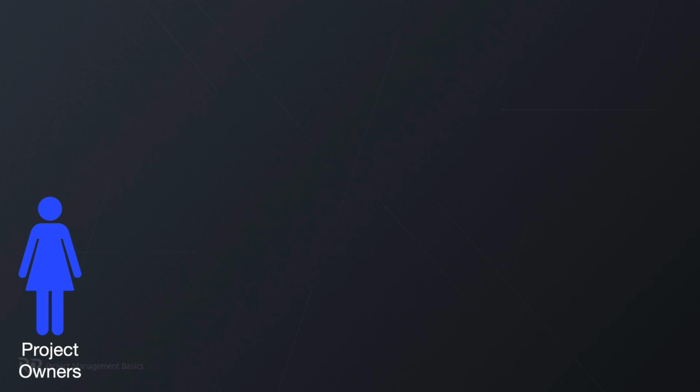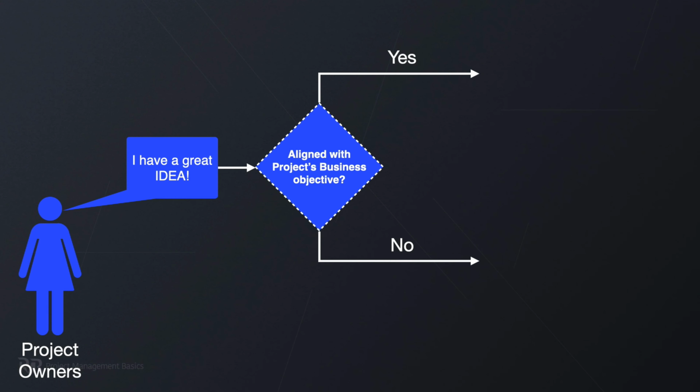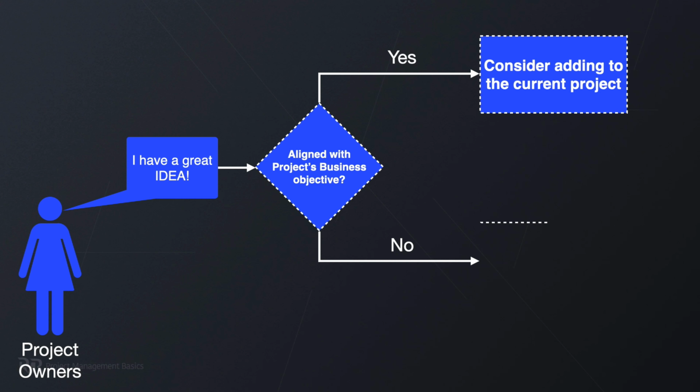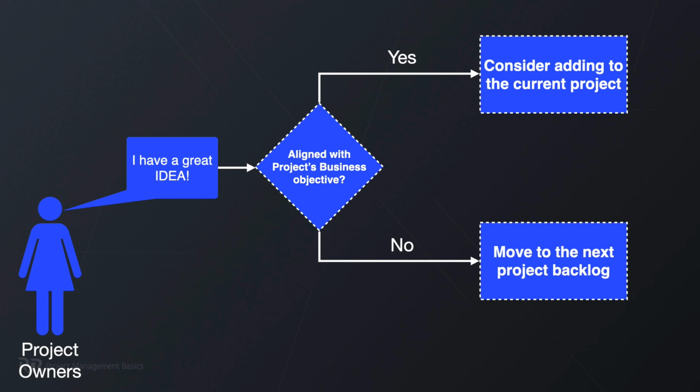In terms of scope creep, you are most interested in the business case of the project. And the idea here is very simple. Whenever there is a need to make a change in scope, you should check whether this change is aligned with the business case. Moreover, does this change help us to reach the project's objectives? If yes, we can negotiate the change in the project's timeline and budget to incorporate this additional work. However, if the business case doesn't support the change of scope, you should reject this change right away.